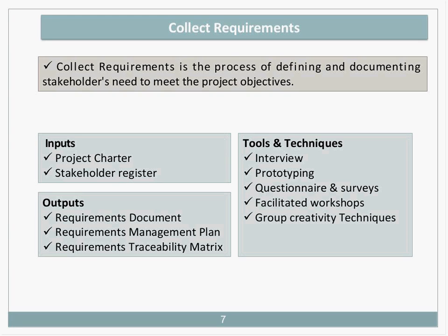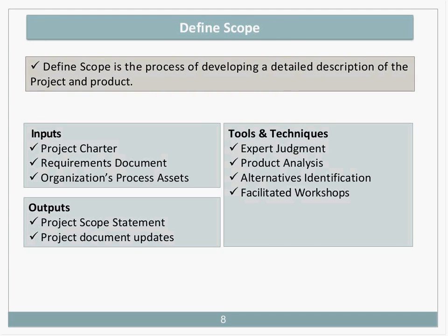Traceability matrix provides a structure for tracking requirements throughout the project to ensure that all requirements are linked to business needs and that only the required work is included in the project deliverables. Any questions on the requirements? Let's continue. If there are questions, I'll answer them as they come.